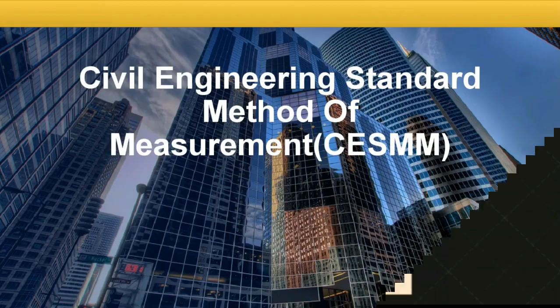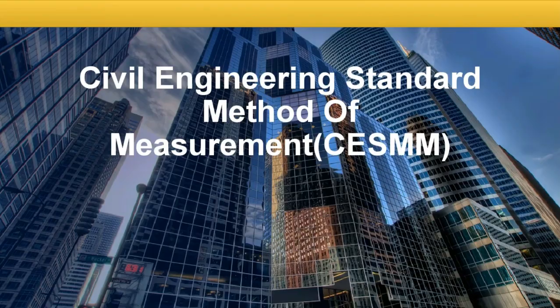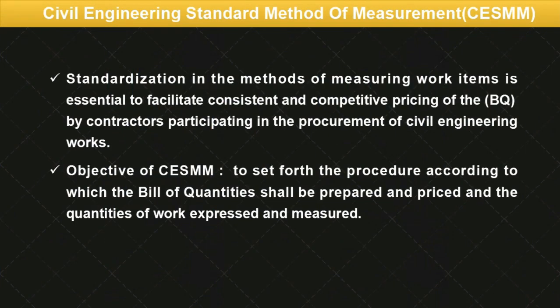Civil engineering standard method of measurement (CESMM). Standardization in the method of measuring work items is essential to facilitate consistent and competitive pricing of the BQ by contractors participating in the procurement of civil engineering works. The objective of CESMM is to set forth the procedure according to which the bill of quantities shall be prepared and priced, and the quantities of work expressed and measured.